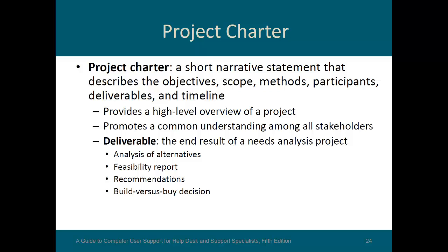Project charter. It's a short narrative statement that describes the objectives, scope, methods, participants, deliverables and timeline. It provides a high-level overview of a project. It's perfect for the C-level people in companies. It promotes a common understanding among all stakeholders. So everyone needs to read the charter and decide whether or not they agree with the charter before they go any further.